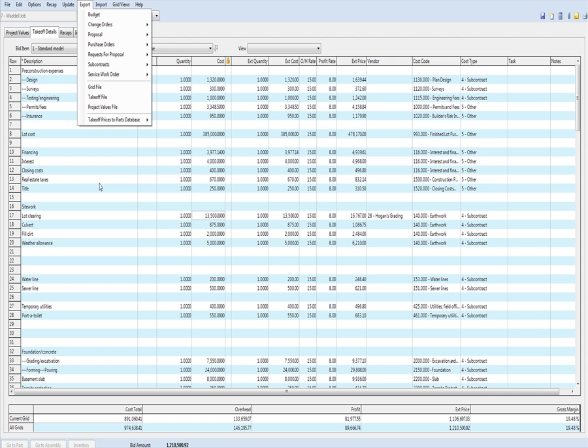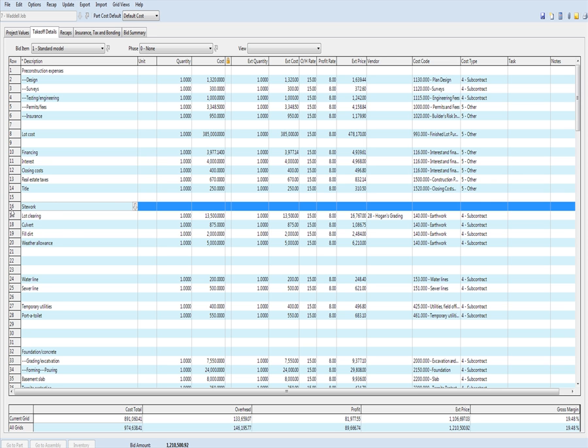And so this is one level, very high level. I know I have site work. I'm going to get somebody to do it, and it's going to cost me $13,500. The culvert's $800. So I get prices, and once I'm done, I can now put markup and overhead on that to give a price to the owner. So that is a high level, and a lot of people do it in that format.